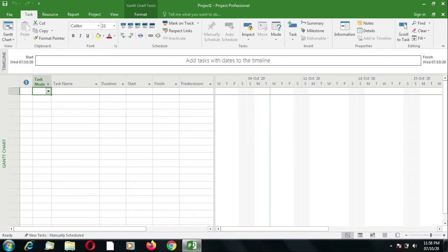So work resources can be measured in terms of their availability, in terms of the rate at which they work on a project. For example, a person can work for 8 hours a day on a project. The same thing with a machine, it can be available for a certain number of hours per day or per week.